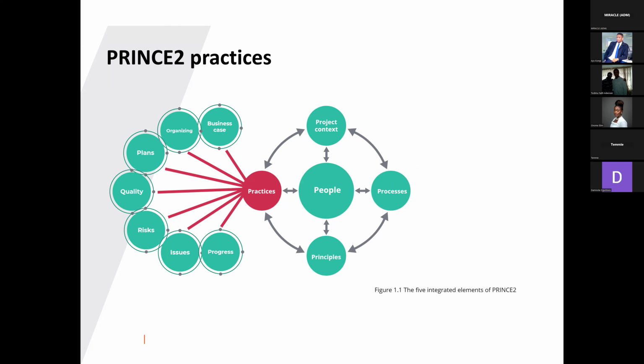Because governance is one of the key things that a project manager or a PMO is expected to do. When you look at roles and responsibilities on JobServe, Indeed.co.uk, or CV library, you will always see that one of the things they put in there is be able to set up governance on a project. So you're coming in to set up how the governance of the project will be, who is reporting to who, what meetings should be done, how many meetings, what meeting fits into what meeting, what reports fit into what particular meeting. As a project manager or PMO person, these are things you'll be expected to come into an organization to set up on the project.